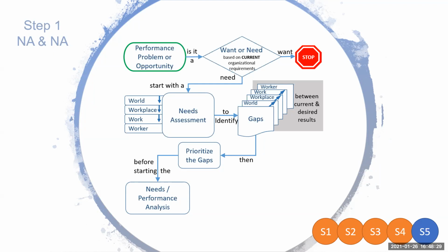The problem was that there was not a lot of coordination between these two groups in the early stages of the exercise planning. And as a result, the quality of the events was lower and the cost of the events was higher because of the inability to work together a year out when they're first starting to plan these exercises. So after doing some research, it occurred to me that, well, first, the tech folks aren't being asked to the design sessions until it's too late. And if they collaborated more at the start and had a synchronized plan from both groups, that would result in lower costs and hopefully a better quality exercise.